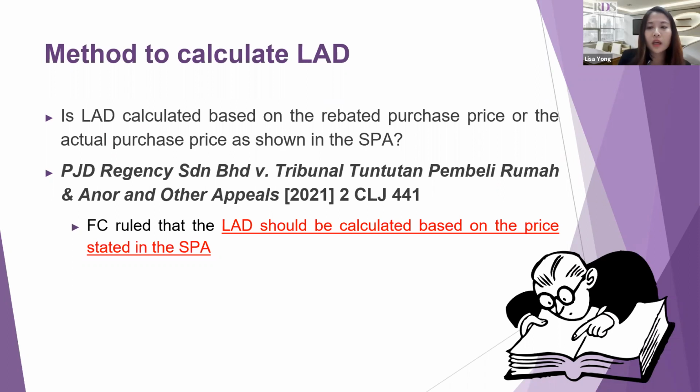So whether the LAD shall be calculated from the price that you actually paid or the actual price of the property. The Federal Court in PJD Regency ruled that LAD should be calculated based on the price stated in the SPA instead of the rebated purchase price. The Federal Court stated that rebates are essentially ex post facto discounts amounting to a refund of monies already paid by the purchaser.